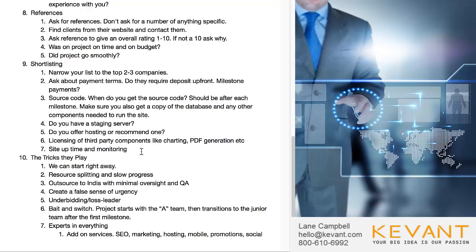But the only thing that you can do is to set up a very low-hanging fruit, quick type of milestone that would be maybe 2 weeks after you sign the contract, to know that there's actually some progress, there's actually someone putting some effort into the project, that type of thing.